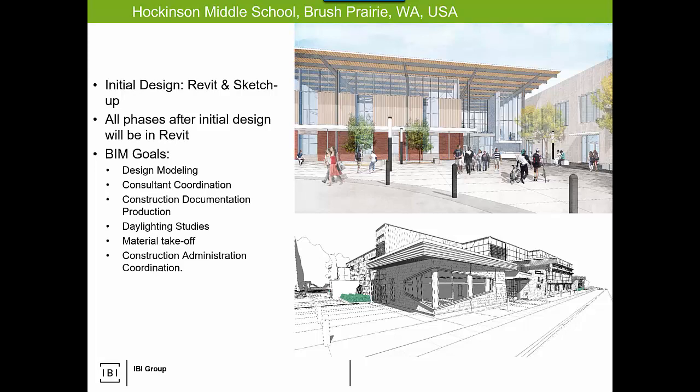Again, material takeoff, it is sort of a push button. And notice I say that, not cost estimation. Cost estimation is a profession. A material takeoff is: scan my model, here's what I have. Now do what you want with it. That only works if you have a good model, right? That's always the crux with a lot of these.